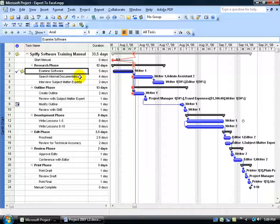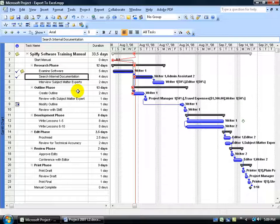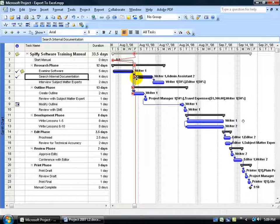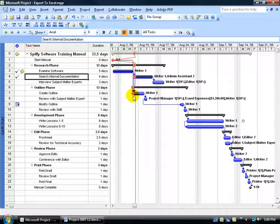To exaggerate, let's come down here and say that this task is completed 100%. Well, at that point in time again, it's bending to the right, so there's the line and it's bending over to the right. So we're ahead of schedule with those tasks. So at that point in time, I can say these other tasks were behind a little bit, were about starting, just behind and weren't progressed, but these other tasks were ahead of schedule.